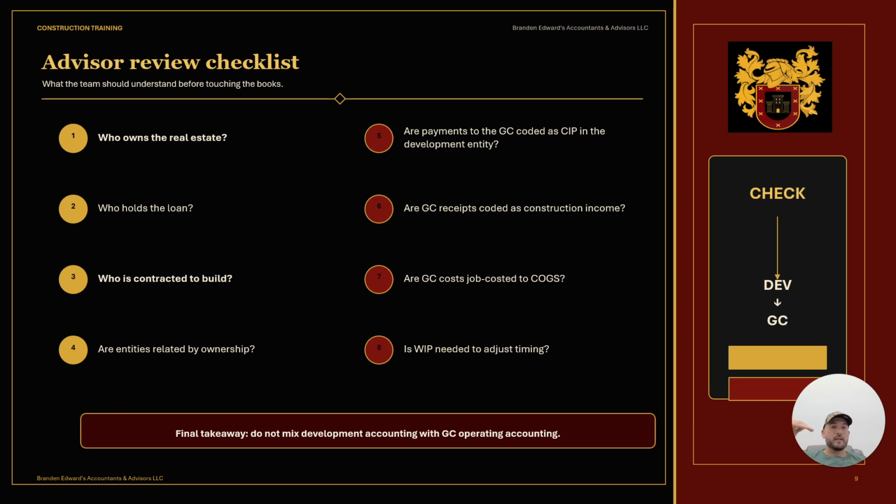100% was my estimate, but let's say for whatever reason we decided to go with a different edging because the material wasn't available, and that was a cost that was not going to be passed on to the development entity. In this case, that is the customer, right? We're not going to go ahead and pass that cost on to it. So let's say it moved the needle by $2,000. So they need to let us know so we can adjust our estimate on the tile. We always recommend that our contractors carry a very conservative budget with their work in progress.